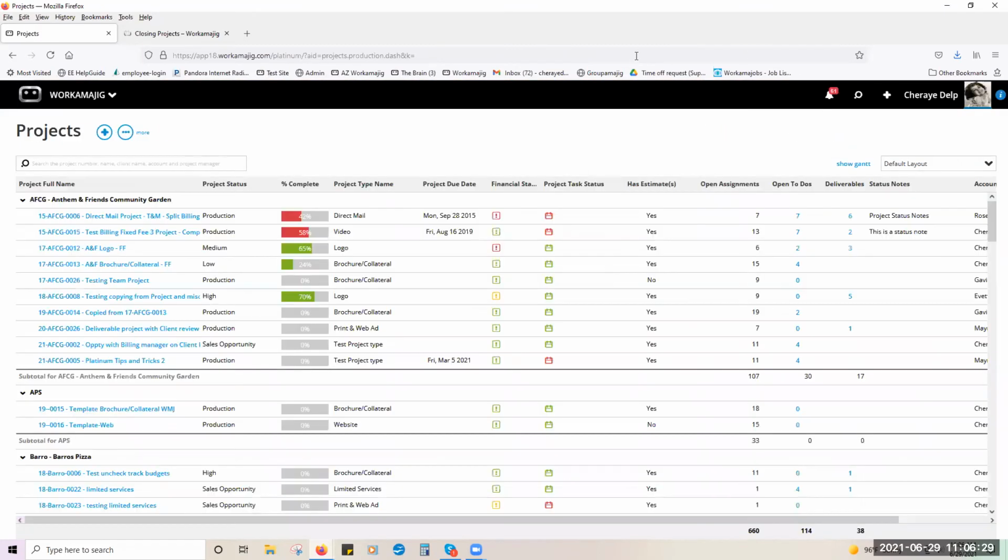And let's see, it looks like there's a few more questions in here. Projects are able to connect with opportunities. Okay, so somebody's asking, are these projects able to connect to opportunity? Yes, your projects can be linked to your opportunity, but you have to start the opportunity first. You start out with the opportunity, you then convert the opportunity to the project, and then the two are linked. It's not in reverse. So the opportunity has to be first, then you create the project once it's been awarded.